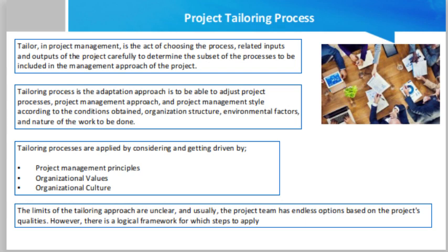Tailoring is the process of adjusting a previously defined process of an organization to obtain a process that is suitable for the particular business or technical needs of a project. You can view tailoring as adding, deleting, or modifying the activities of a process so that the resulting process is better suited to achieving the project's goal. Uncontrolled tailoring effectively implies creating a process from scratch, so to allow effective reuse of previously defined processes,